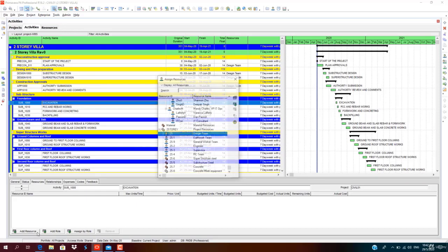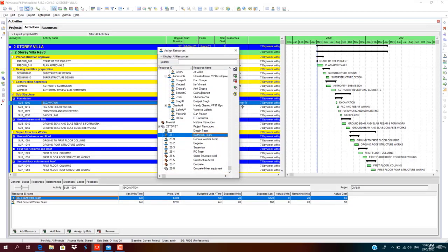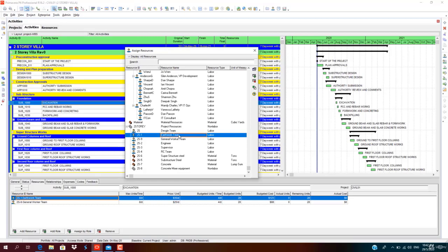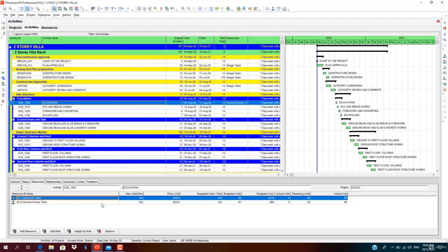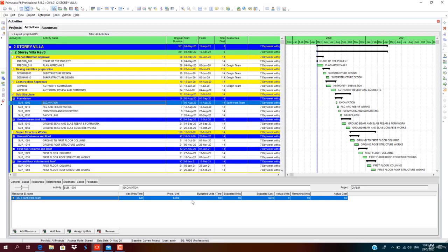So for excavation, we need the general earthwork team. You can drag or you can customize the view, like you can expand it. Only the earthwork team is required. You don't need the general worker for this. Remove the general working team. You can remove here. Click on remove. Select yes. Okay. So price per unit, budgeted units, 8 into 7 is 56. Then we are getting a budgeted cost of 245. So we shall continue to add